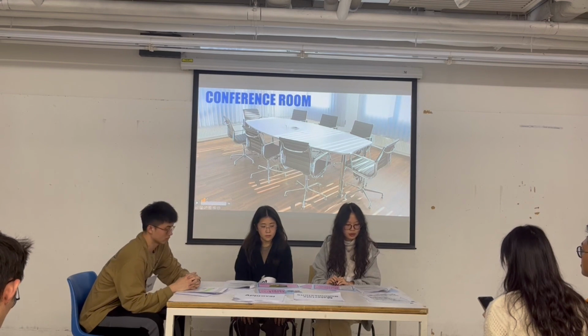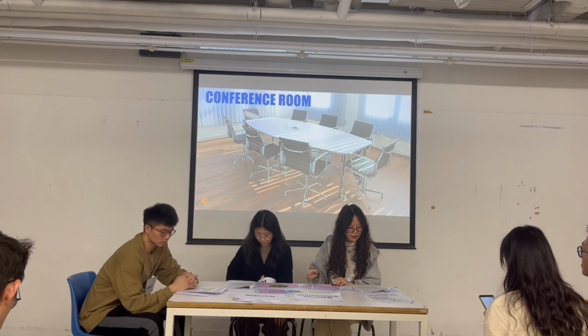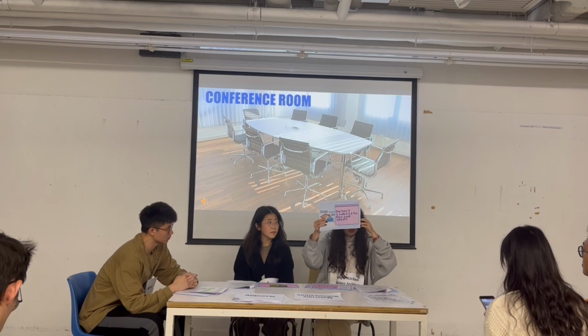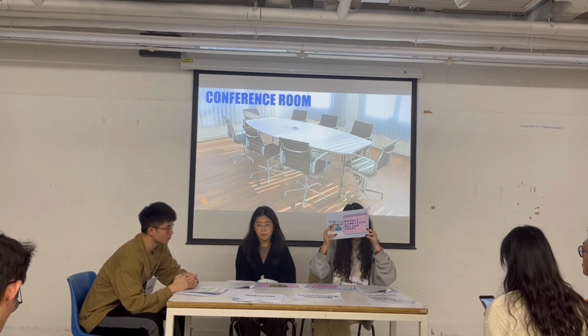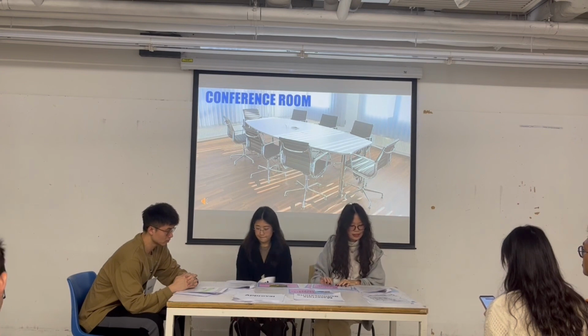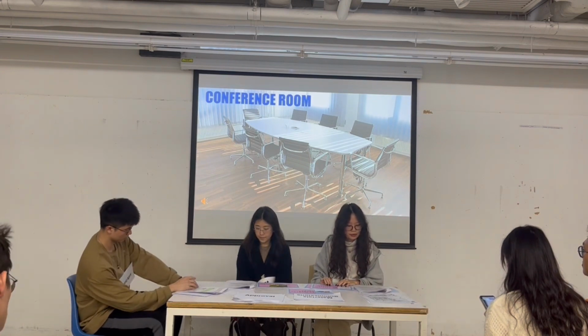At this point, the project is considered functionally complete, although minor defects or issues may still need to be rectified during the defect liability period. Practical completion signifies that the main scope of work has been finished.